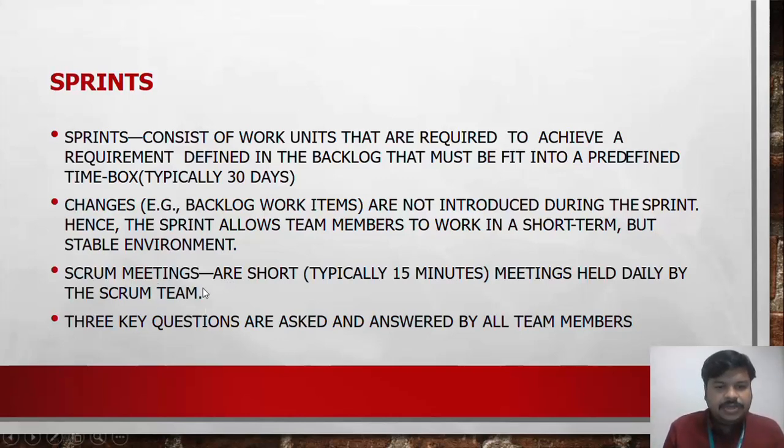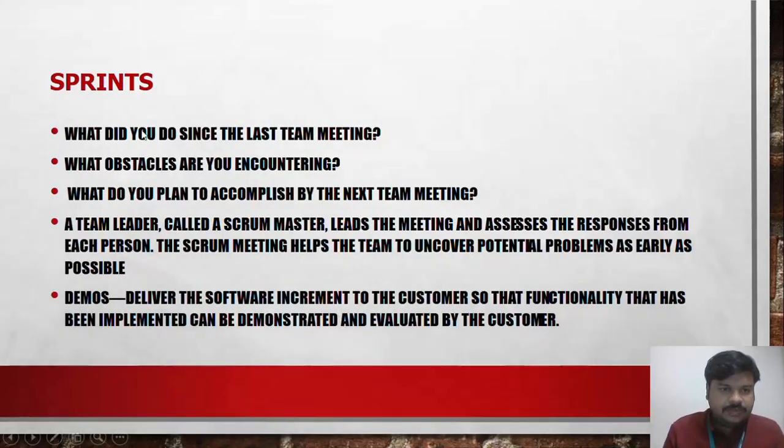Scrum meetings. It should be short, that is 15 minutes. In 15 minutes, we have to deliver the Scrum meeting. What are the things we have already done? What are the things we are going to do? There are three questions that will be answered by all team members.